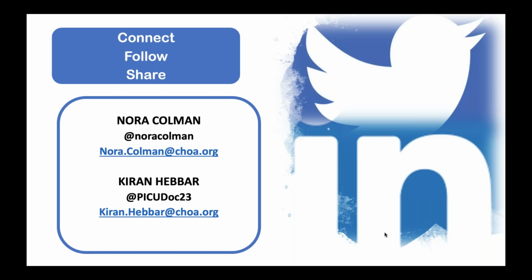So if you are in an institution, you probably have never done this before. And so nobody really understood what it meant, though they bought into the project and gave us support to do it. So we had to spend a lot of time getting everybody to understand the purpose and the intention. We actually met with all of the clinical stakeholders and leaders in in-person meetings, because we realized email was not an effective way to communicate. And so we sat down with all the clinical leaders individually, and described why we needed their staff, why we needed their buy-in, and what we were going to be doing.